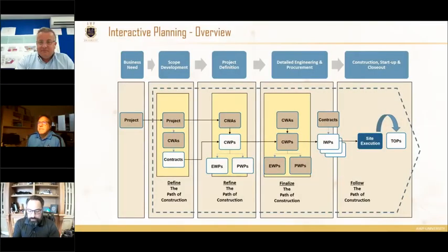So the last slide that I covered earlier, which was the path of construction integration and the milestones themselves. Often in different projects, what happens is we get caught up in facilitating different meetings, facilitating different programs or types of exercises, and forget to actually bring in the gates and the checks and balances that we need to understand before we move to the next steps with certain aspects. So just on a general basis, of a lot of forgotten items, or things that should be implemented on projects, making sure that you follow those gated processes before you say that we've moved to the next level, I think is the one thing that I would focus on.